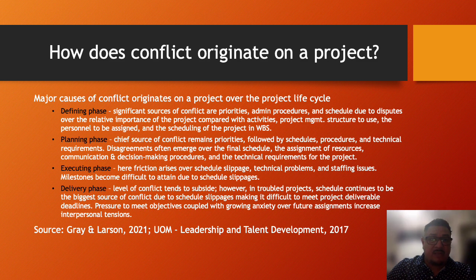In the defining phase, significant sources of conflicts are the priorities, administrative procedures, and schedule due to dispute over the relative importance of the project compared with activities, the project management structure to use, the personnel to be assigned, and the scheduling of the project and the work breakdown structure.